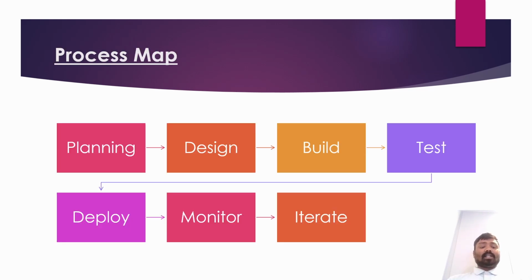But notice the LCA review decision gate after the initial prototype. Here we require the LCA report to demonstrate at least 30% improvement over a conventional greenhouse before moving forward. If it falls short, we iterate material choices or optimize the manufacturing process.